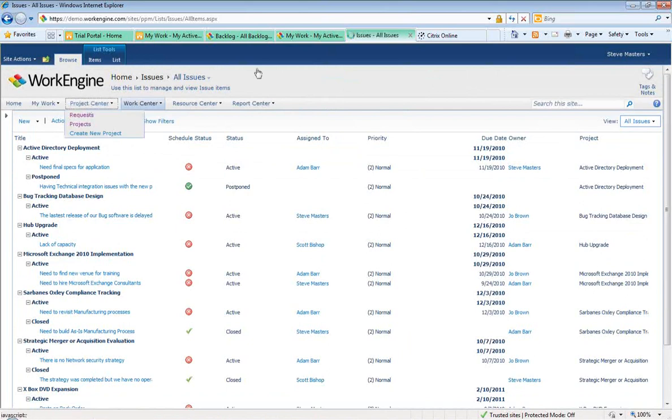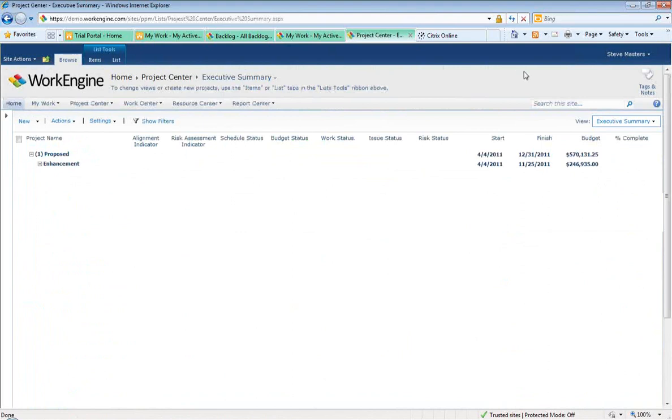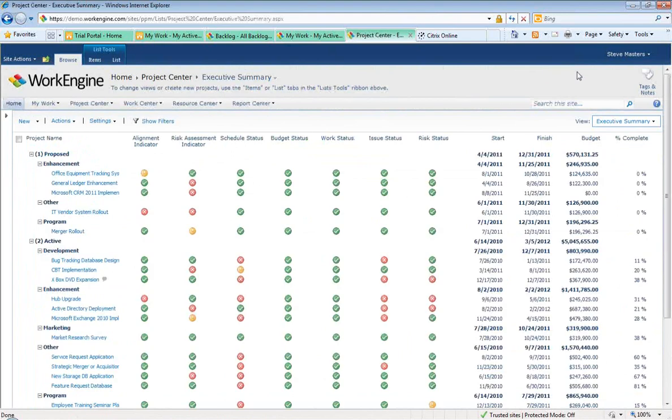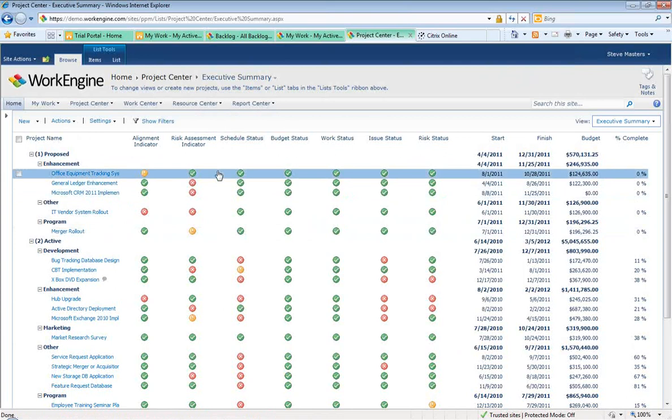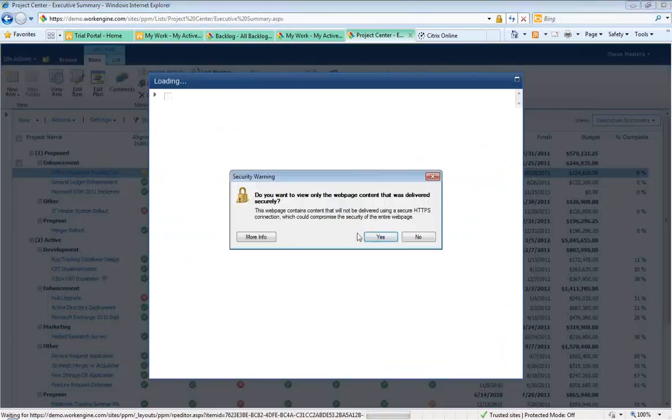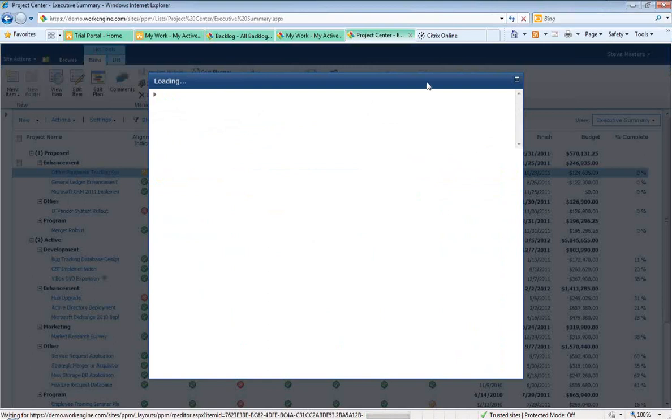Now if I go back to my Project Center, we did mention that we had some portfolio capabilities we can add to the Project Server mix. So here, the projects and the work that got generated from within Project Server are listed as portfolio items. We can actually go into a specific portfolio item and, for example, build a capacity plan. This capacity plan would give us the ability, at a high level, long before we have a project schedule, as I mentioned earlier, to build a resource-based plan for each of our portfolio items, even if they're just proposed portfolio items that don't have any real schedule detail behind them yet.